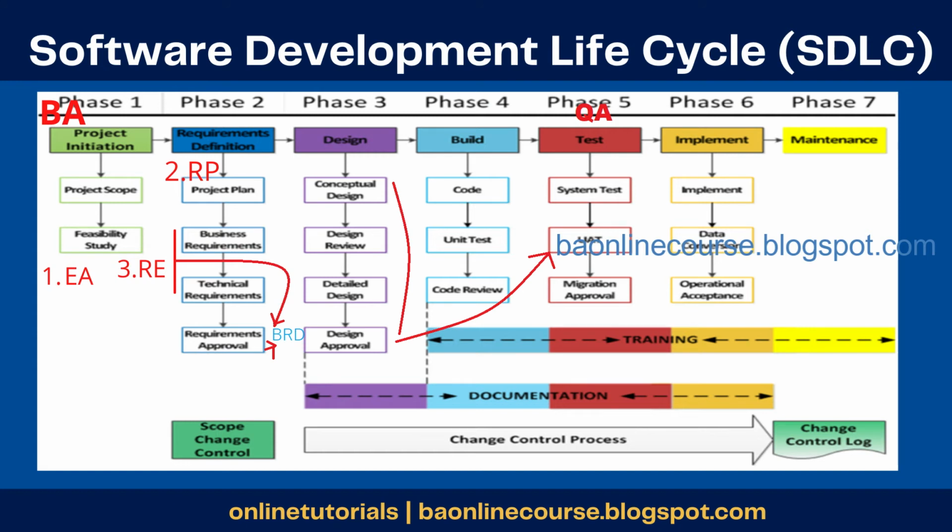Right? So maybe we can take it up in multiple phases. You'll break down that system into 4 parts and say, part 1 I will implement first with all the most important requirements. Phase 2 I would implement with the next important set of requirements, so that I don't have to wait 3 years, right? If you have done it in 6 parts, then every 6 months I would have something to use, right? So you can maximize the value derived from the system. So this is called an iterative model.